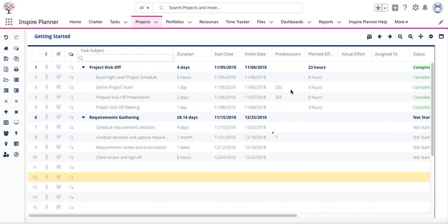The code will display for the other three types of relationships. So in addition to start to start and start to finish, we also have finish to finish and that will display with an FF code.